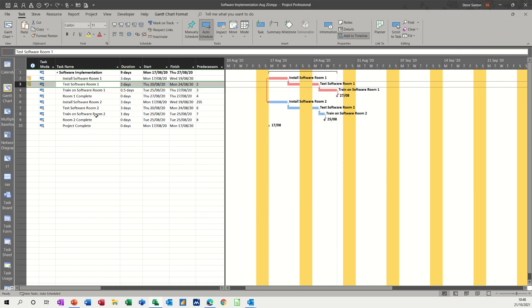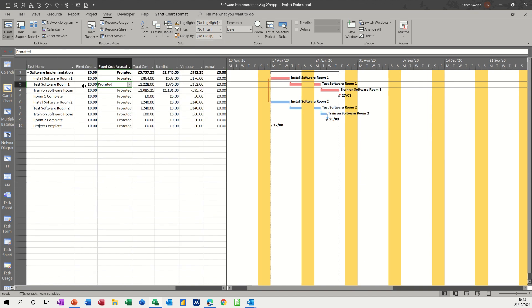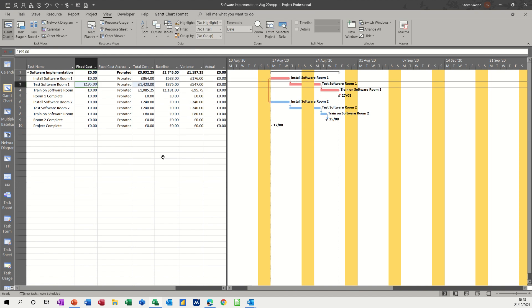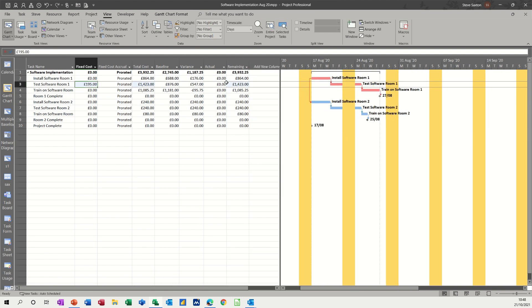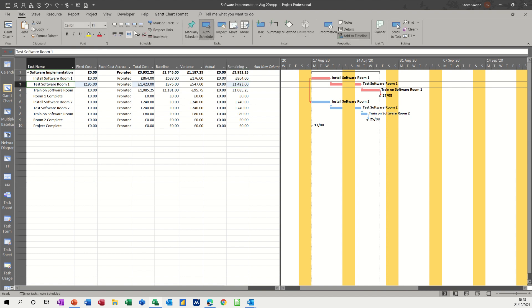Click OK. So if I change this table, I'll go view tables to cost. So there is where I would put the £195. There's a fixed cost of £195. And you can see there, so I've got a baseline here, so there's quite a lot of variance off the baseline. But if I spend that, or if I do 100% complete, see that's the total cost, that's what's remaining. Nothing's been spent. But if I put that to 100% complete, nothing remaining.